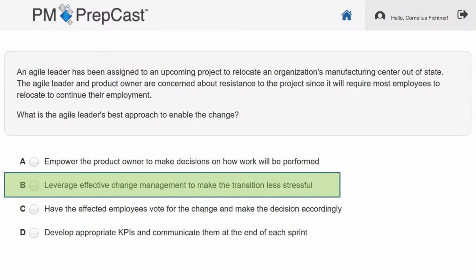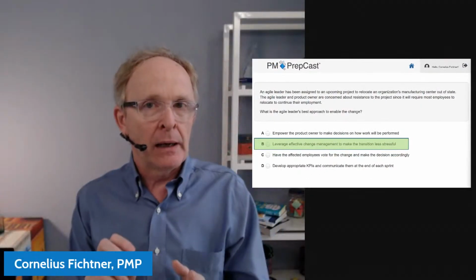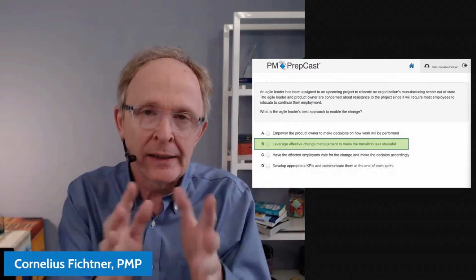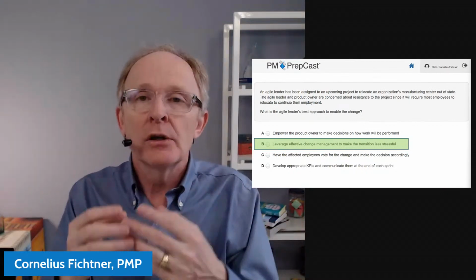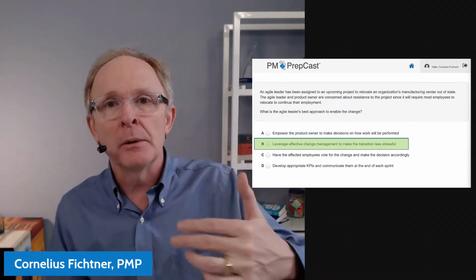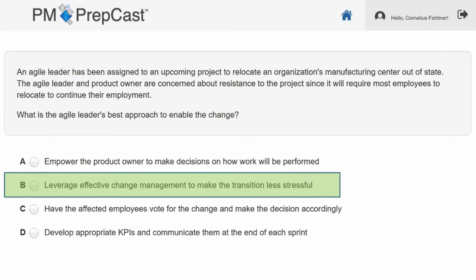Yes. And one thing to also point out at this moment here is change management is fundamentally different from change control, right? Change control is a process where modifications to identified project artifacts must be approved before implementation, whereas change management enables change to achieve the project's desired benefits. Right. A little while ago here, we had the scenario where we talked about, you have to get approval to make a change to the risk register. That would be change control. Okay, that was the wrong answer back on that particular question, but that is change control, requiring an approval to make a change, whereas change management is to put the appropriate processes and the approach in place to make it so that the change can go through. Okay.